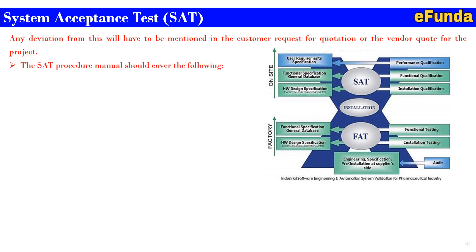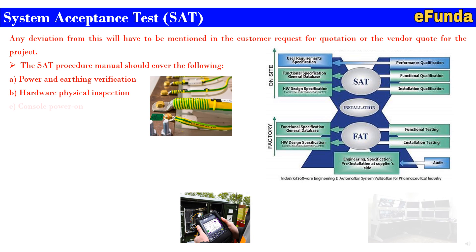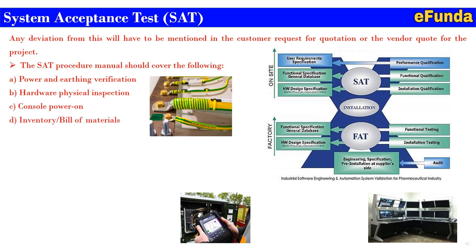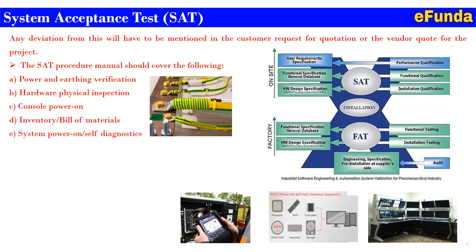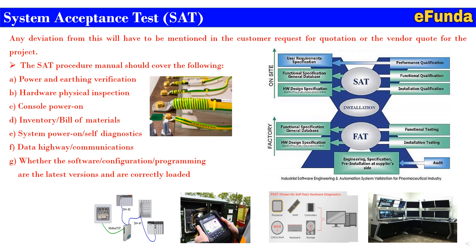The SAT procedure manual should cover the following: A — Power and Earthing Verification; B — Hardware Physical Inspection; C — Console Power On; D — Inventory Bill of Material; E — System Power On; F — Self-Diagnostic; G — Data Highway for Communications; H — whether the Software Configuration, Programming, or Latest Versions are correctly loaded; and the last item is subsystem interface devices. This is how the complete interface of the system is checked at the site after installation, with operator or actual equipment connected in line.